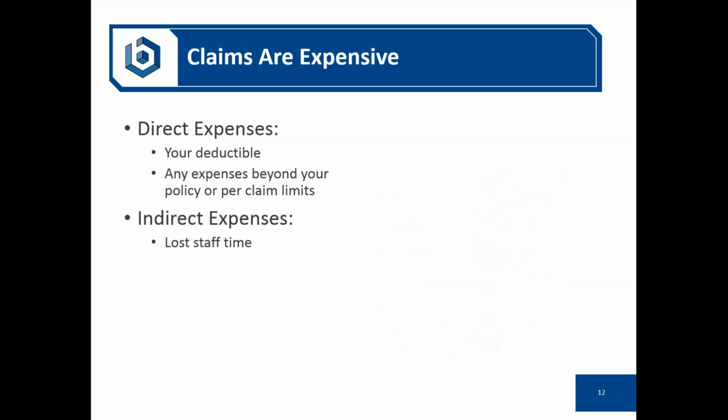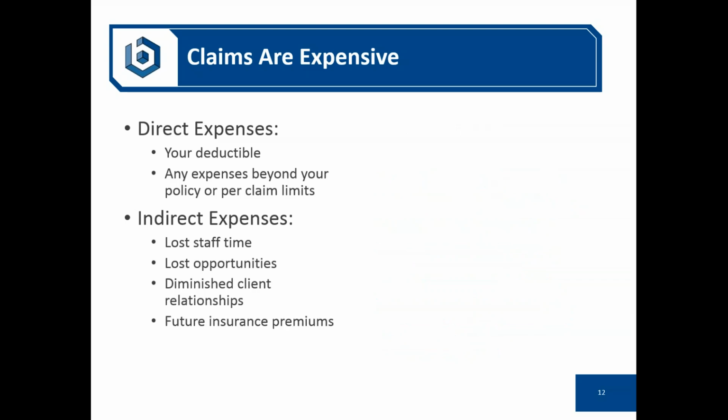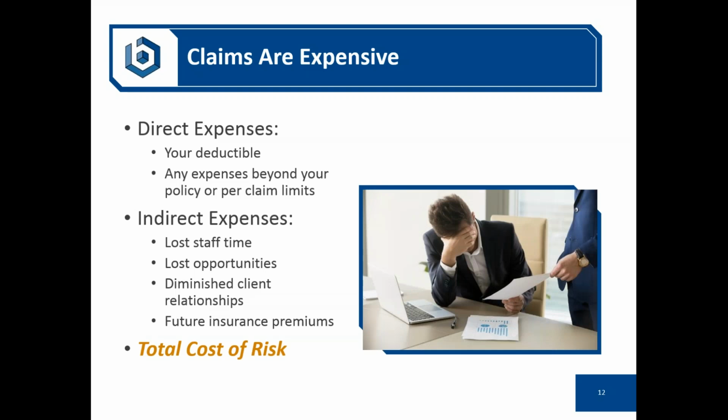So it's quite costly. You also have the distraction element. Anytime you spend defending a claim means a lost opportunity, time you could be spending on your projects or developing new business. You're going to be finding yourself challenged probably with your client relationship, because about 90% of claims are filed by your client, and anything that gets into the insurance company's dollars becomes part of a loss ratio and has a negative impact on your future insurance premiums. So all of that is the total cost of risk. And that's why we feel you need a risk management plan to avoid these types of claims.